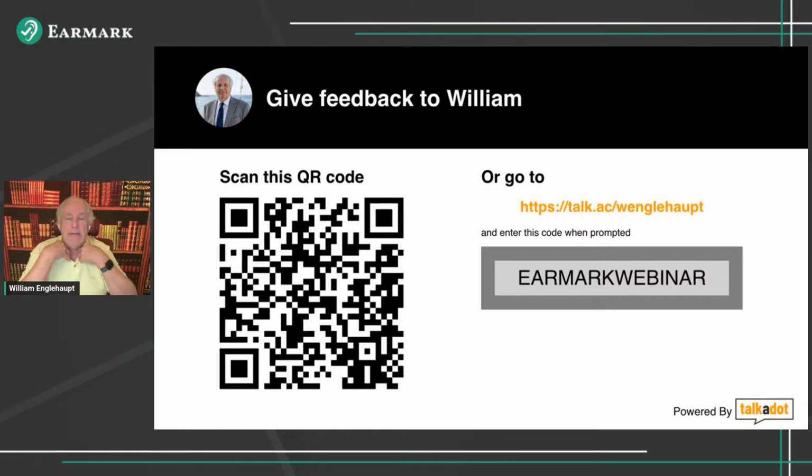And the individual that prepared it has a very clear picture of, okay, we all, 3 reviewers or 2 reviewers, we agree the following 5 things need to be fixed. That person then can go back with a really clear picture of what's done, get that work cleared quickly, and it eliminates a lot of the send it up, send it back, send it up, send it back kind of thing that you get into with all these rework loops. And so that to me is also a really powerful tool.